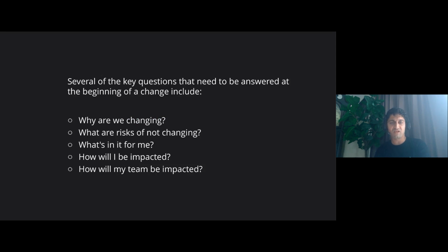So when you start off on any new transformation or project, there are a few questions that you need to answer. The first one is quite intuitive. Why are we changing? What are the risks of not changing? The what's in it for me, which I spoke about earlier. How will I personally be impacted? And of course, if you're a manager or a user champion, how will my team be impacted? There are many more, but these are some of the key things that you need to think through and prepare for at the start of a change.